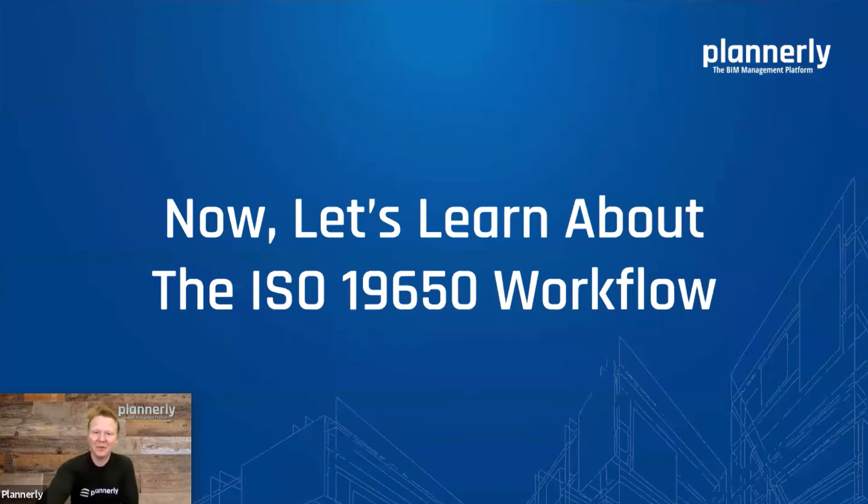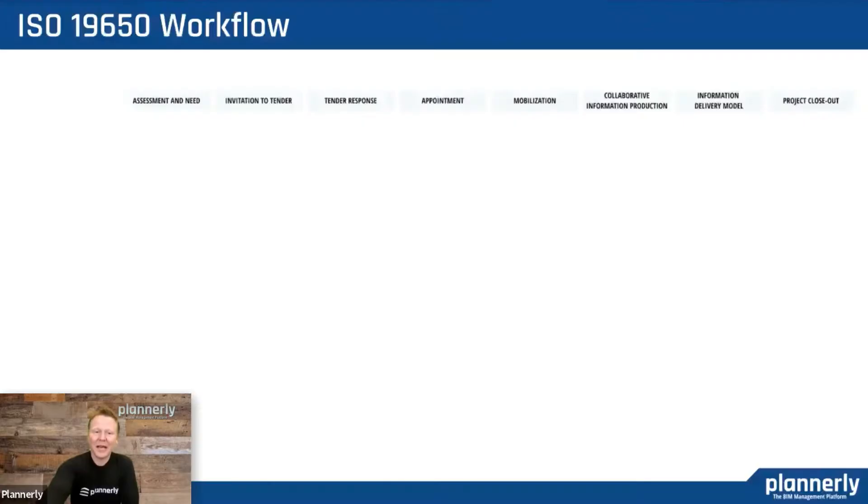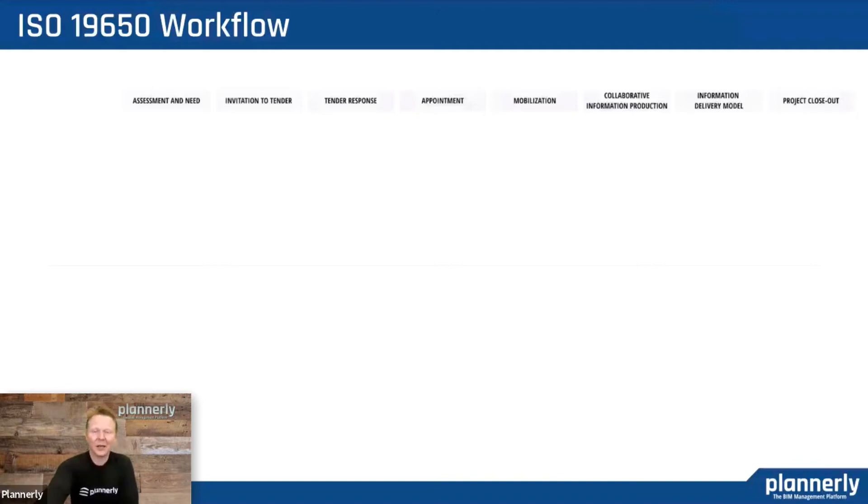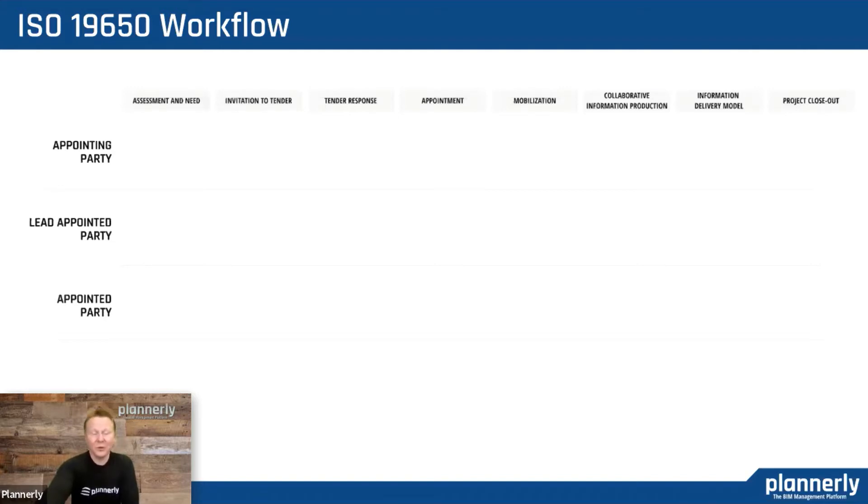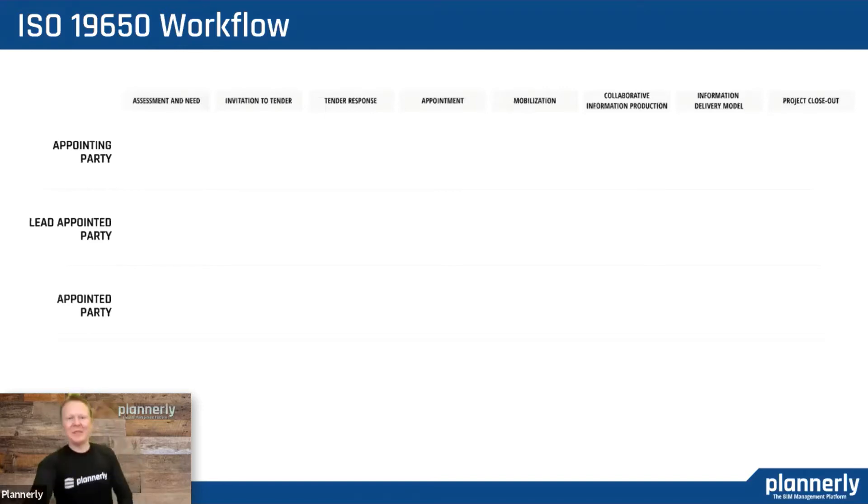The ISO 19650 workflow has eight main steps ranging from assessment and need to closing out a project, with swim lanes for the teams involved: the appointing party, the owner or person paying the bill, the lead appointed party, and the team responsible for coordinating everybody.